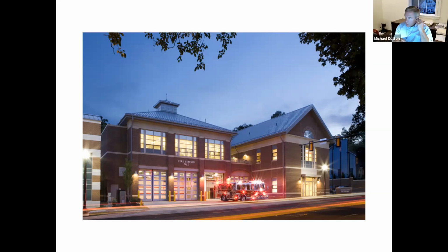Okay. So you need 3 to 4 weeks. 3 to 4 weeks from when you say go, I should be able to come back with that really ugly number. And then you have an opportunity to decide: do we recycle it back into revisions to the schematic plan, revisions to the needs assessment, revisions to the site, or do we just accept it and say, this meets our needs, this is what we need for the future, and this is what we should be planning for.